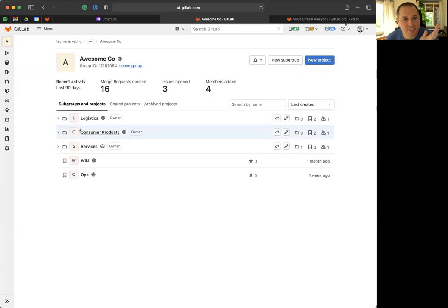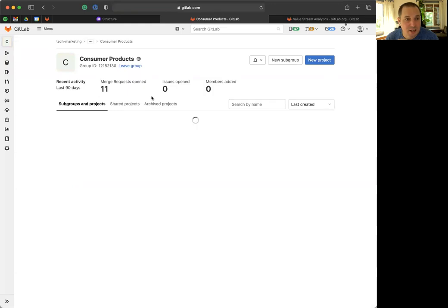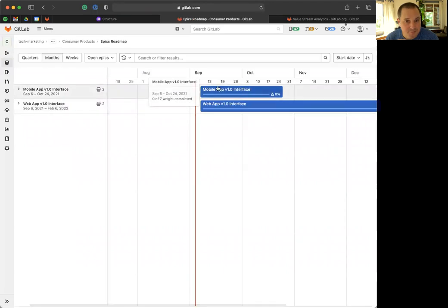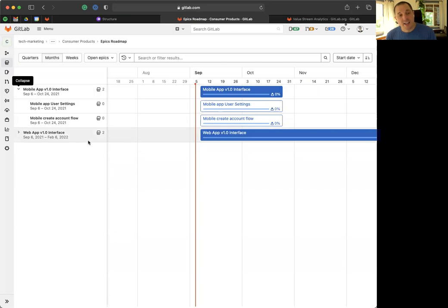But if you want, let's say, your team to have their own views into only their own things, and I go into this consumer products group, I can also from this view go to view my epics or view my roadmap, and I see just those roadmap items which are within the consumer products group itself. So I don't see the noise of everyone else. I can just see my work. This is great for a product owner to be able to view things at this level, maybe a product manager at the higher level, but you have these different options for how you roll your work up depending on where you create it.